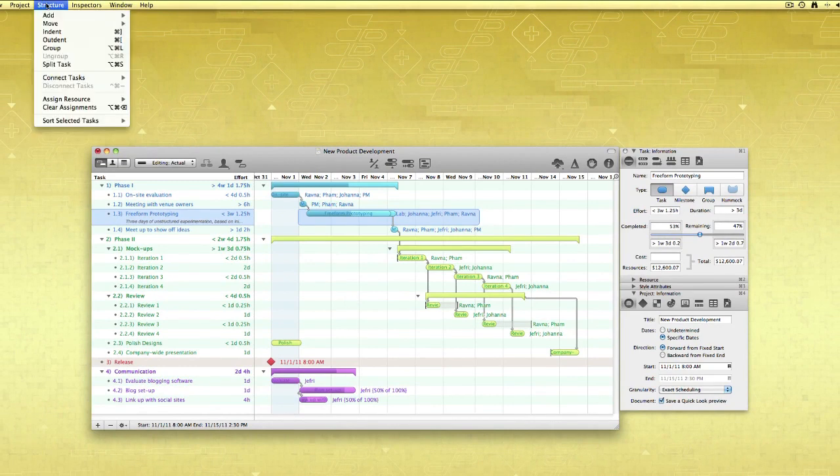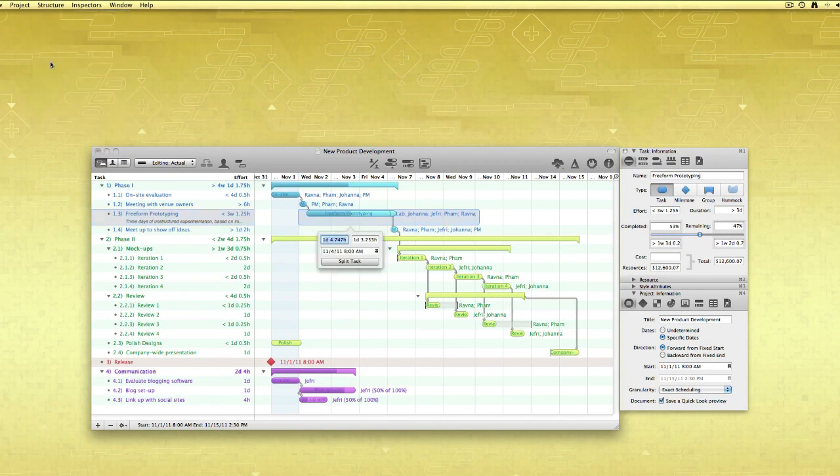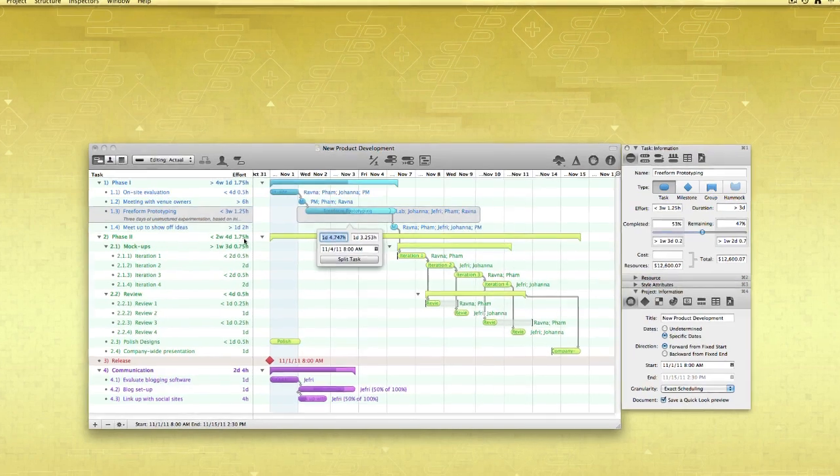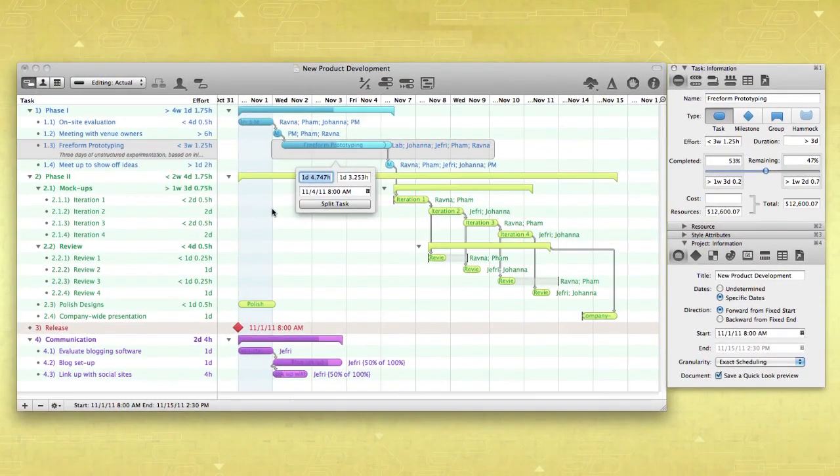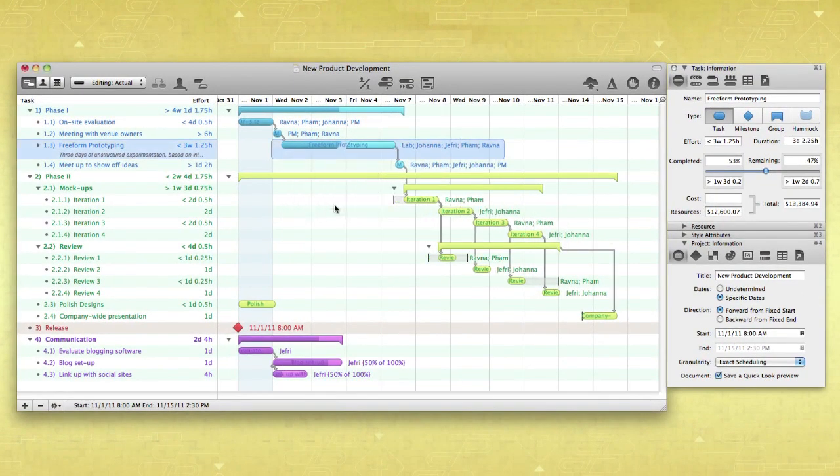Just choose Split Task from the Structure menu, enter the amount of work completed, and click here to allow for subsequent completion.